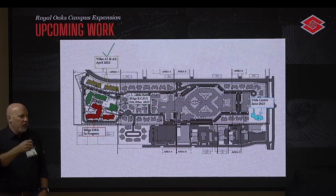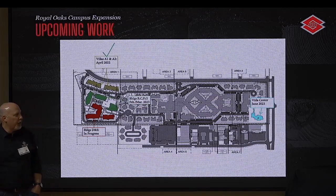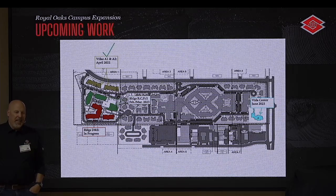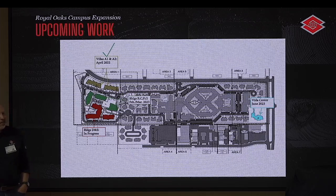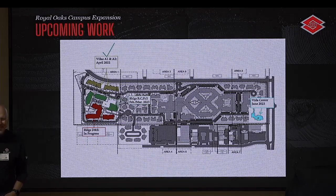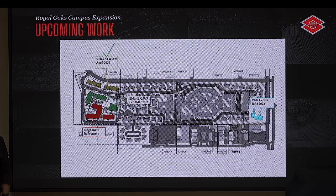We're going to replace this chip in the first floor double doors at the bridge today, and then get the county back out. And again, the stuff on their list, they had us move the temp fence for occupancy. Come on, that's our business, not theirs. But we moved it. So I would say this week is our goal for C and 2 weeks for B.